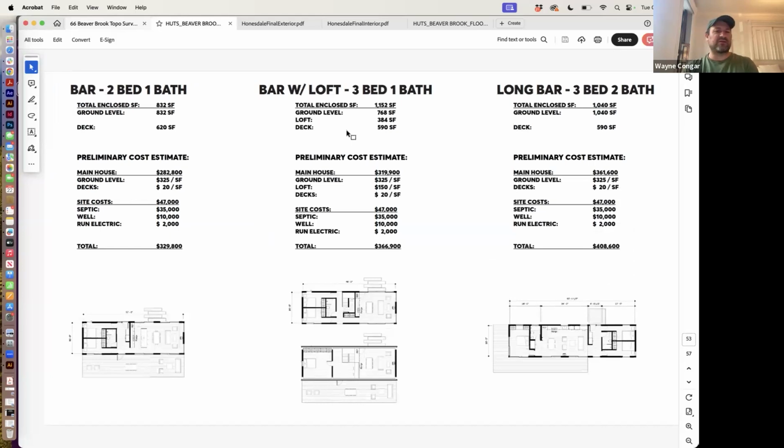And then, like always, compare these financially as early as possible to help inform our clients not just on the design decisions and the layout decisions, but also pricing. What's the meaningful difference between these, and how can you pair a design perspective with the development math and make an informed pocketbook decision on what we're going to document further? It's important to remember that this is essentially our first or second meeting with this client, and we're looking at site, floor plan, and pricing for the house incredibly early in the sequence, to be able to make tight decisions on what we're going to spend our design time working on.